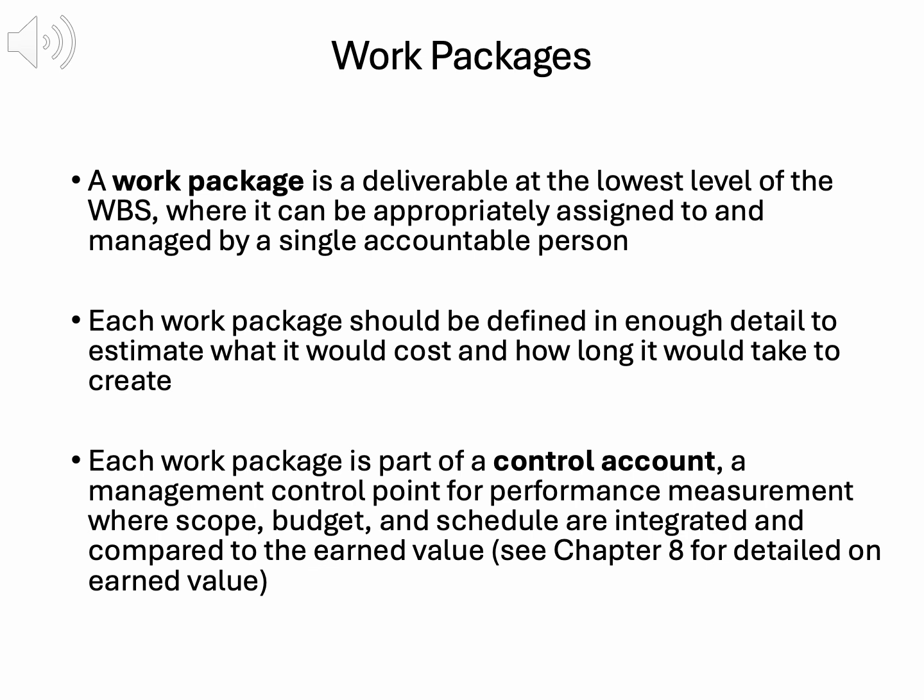The importance of work packages lies in their granularity. By breaking the project into small, specific deliverables, they enable accurate planning and control. In the training project, work packages like course development or pilot course delivery ensure all tasks are accounted for, preventing scope creep. Creating work packages involves team collaboration to define deliverables clearly. They focus on outcomes, not activities. Survey administration, not send survey. This aligns with PMI standards, avoiding confusion with schedules.